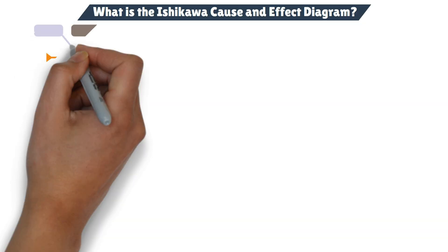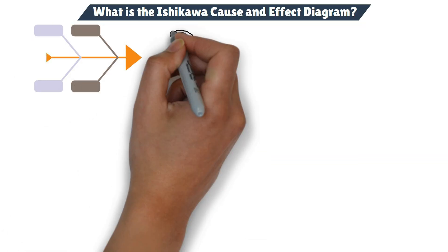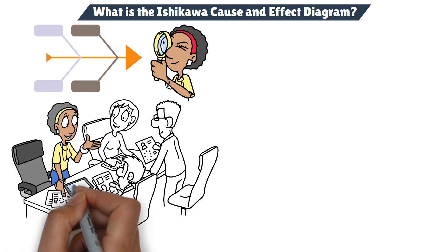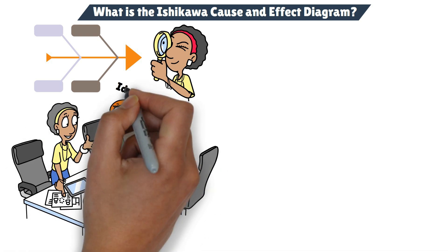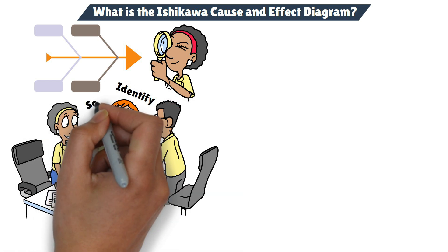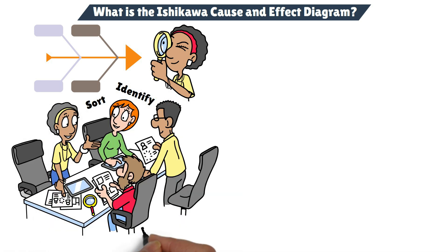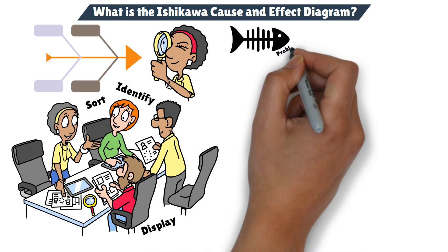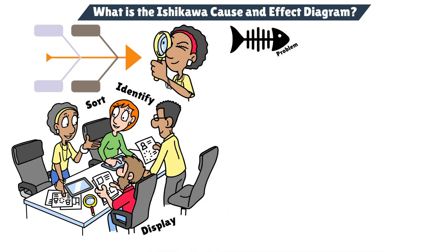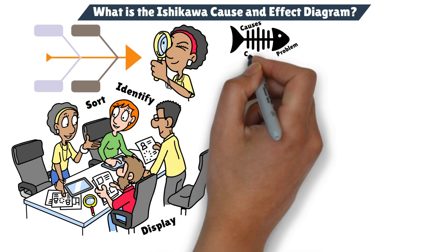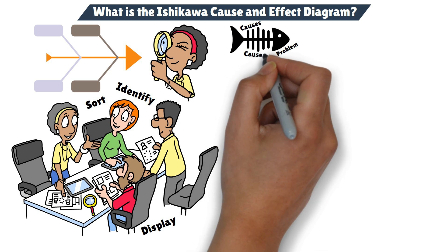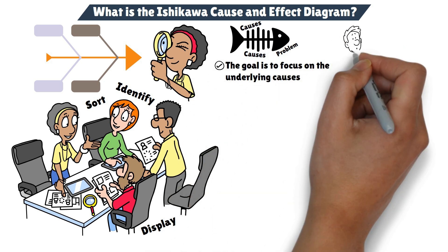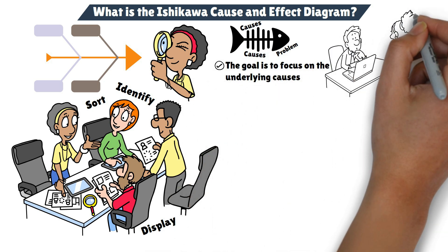The cause and effect diagram is a visual tool used for root cause analysis. It's designed to help project teams systematically identify, sort, and display possible causes of a problem or effect. Imagine a fish's skeleton — the problem is placed at the head, and the possible causes are laid out as branches along the spine. The goal is to focus on the underlying causes rather than just dealing with the symptoms of an issue.